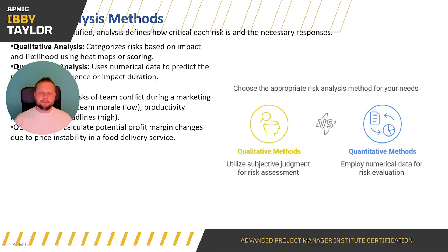And then, what's the impact score on the project? If you've got something which is quite likely to happen and has a high impact on the project, that's going to have a higher priority than something which isn't very likely to happen and isn't going to have a very high impact. So you can use those scores to help you identify which are the key ones to focus on.